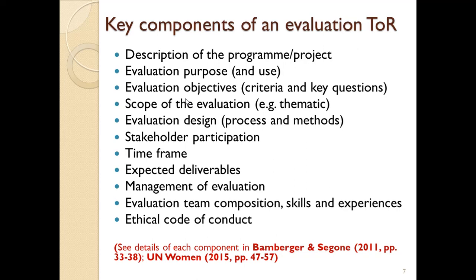So the terms of reference package involves many aspects and many components, and some of them would include description of the program or project. So in other words, the background, what the project is about, who are the target population, who are involved, what the goods and services or intended outcomes are, what the purpose is, the objectives, and so on. So all that description of the project, including location and the rest.